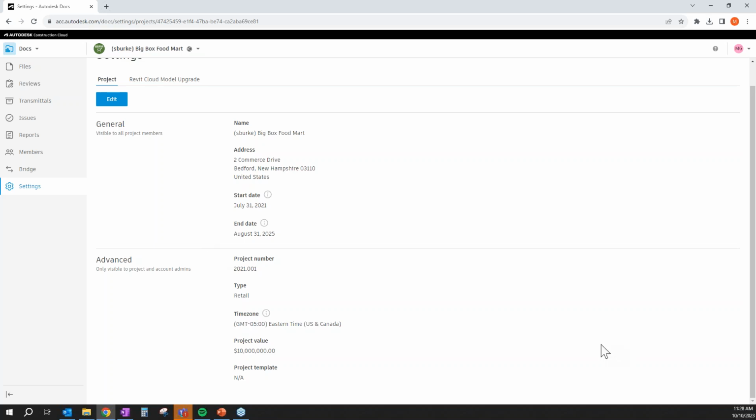One important thing to note is as you start building up your Autodesk Docs platform or your Build platform and you start setting these projects up, you're able to set them up using a project template. What that's going to do for you is automatically preload files in. One example that I always use is OSHA sheets. If you're supposed to be keeping certain OSHA sheets listed in your job trailers on site, put them in your files folder. Make those automatically upload as soon as you create a project so that people aren't having to hunt those down later on.